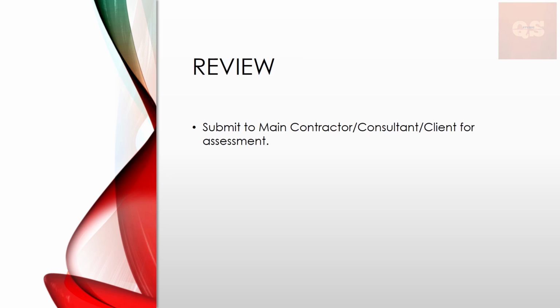The third step is review. Once the documentation is done, and all your costing and everything is worked out, you have to submit it to the main contractor or a consultant or the client. If you're a subcontractor, you submit to the main contractor. If you're a main contractor, you'll be submitting to the consultant or directly to the client.